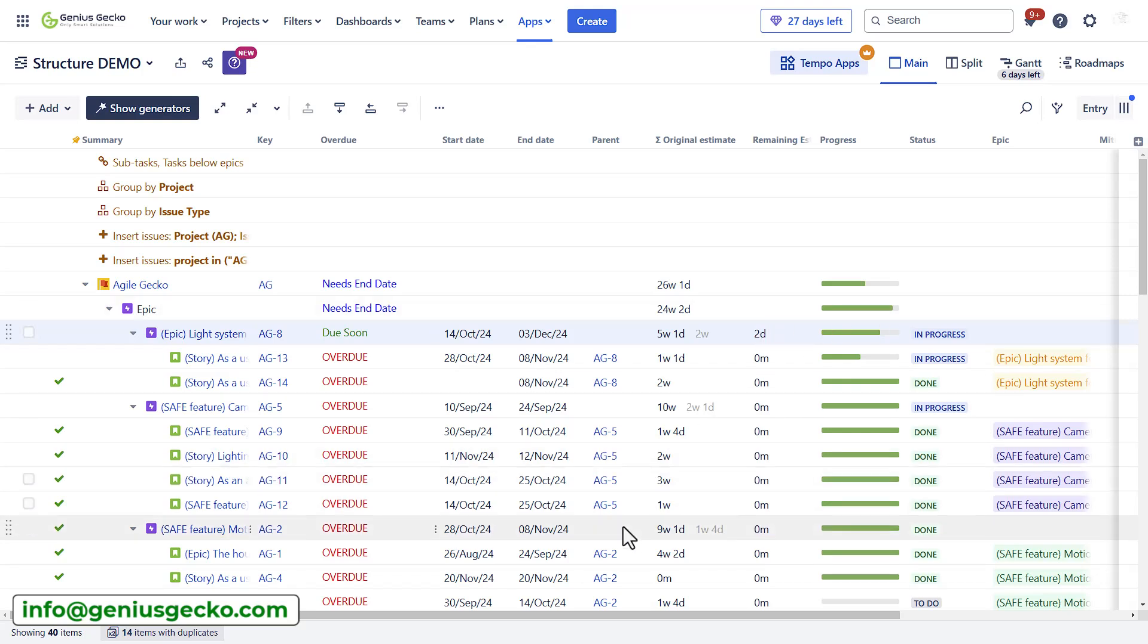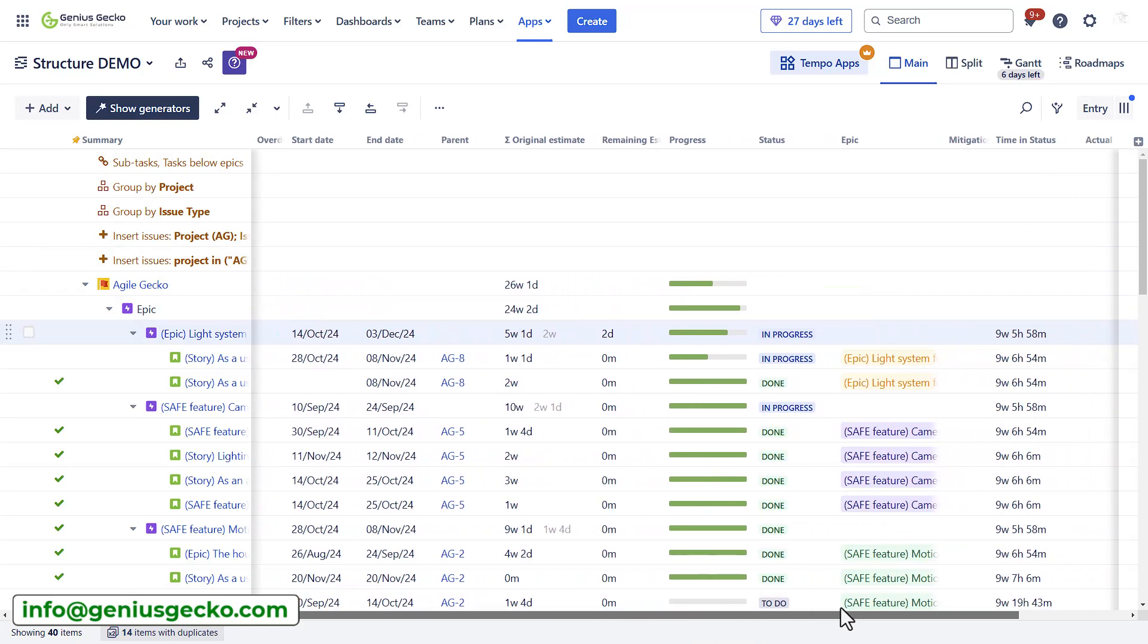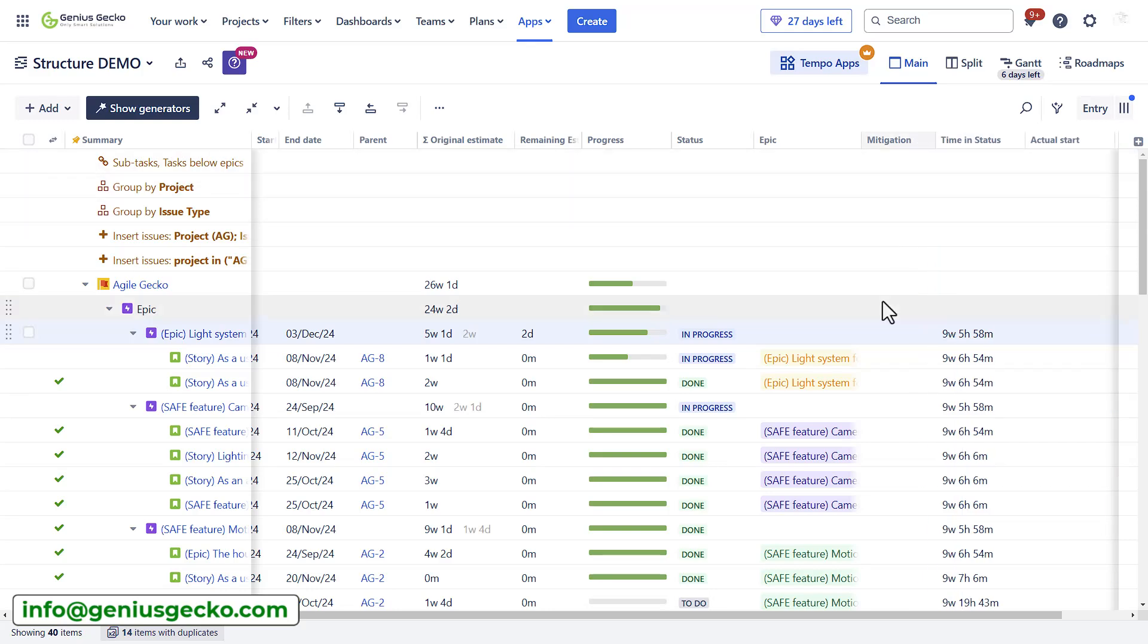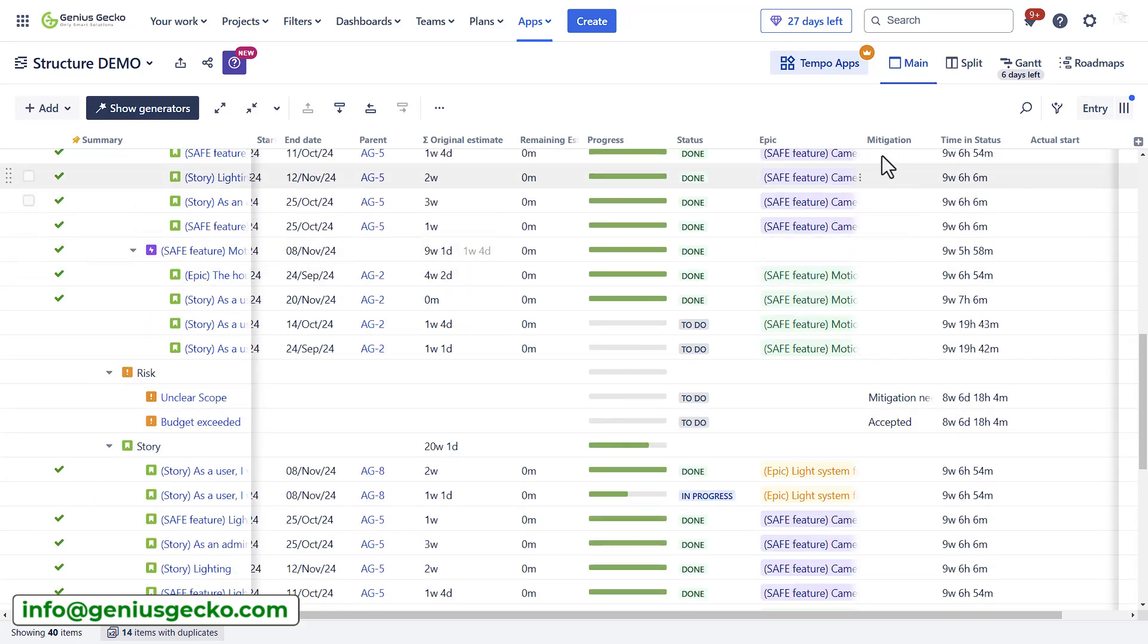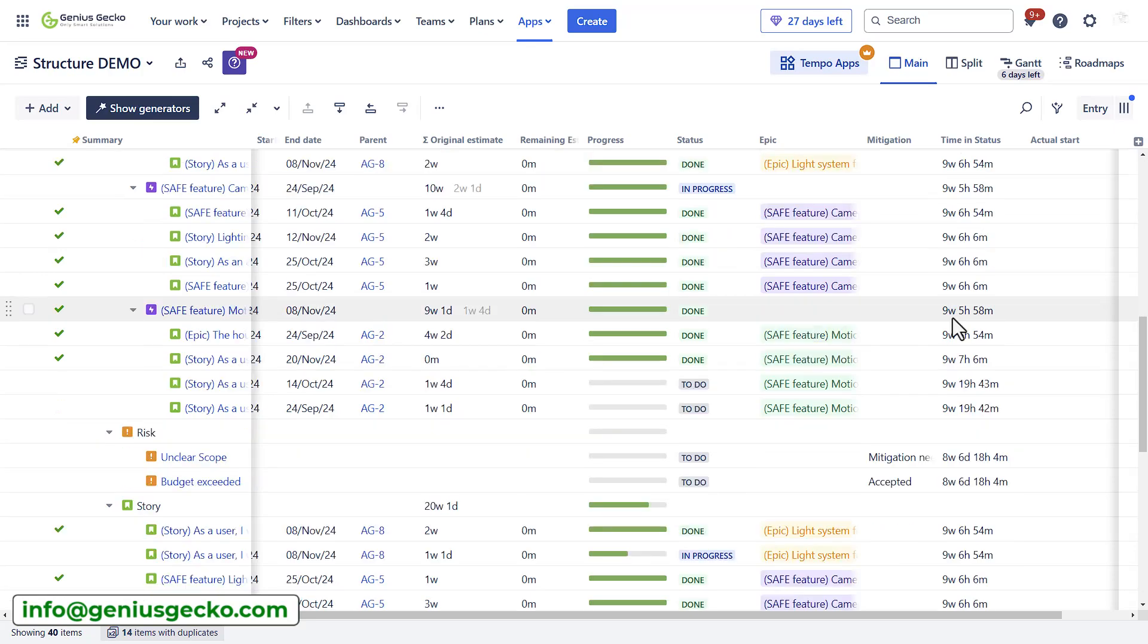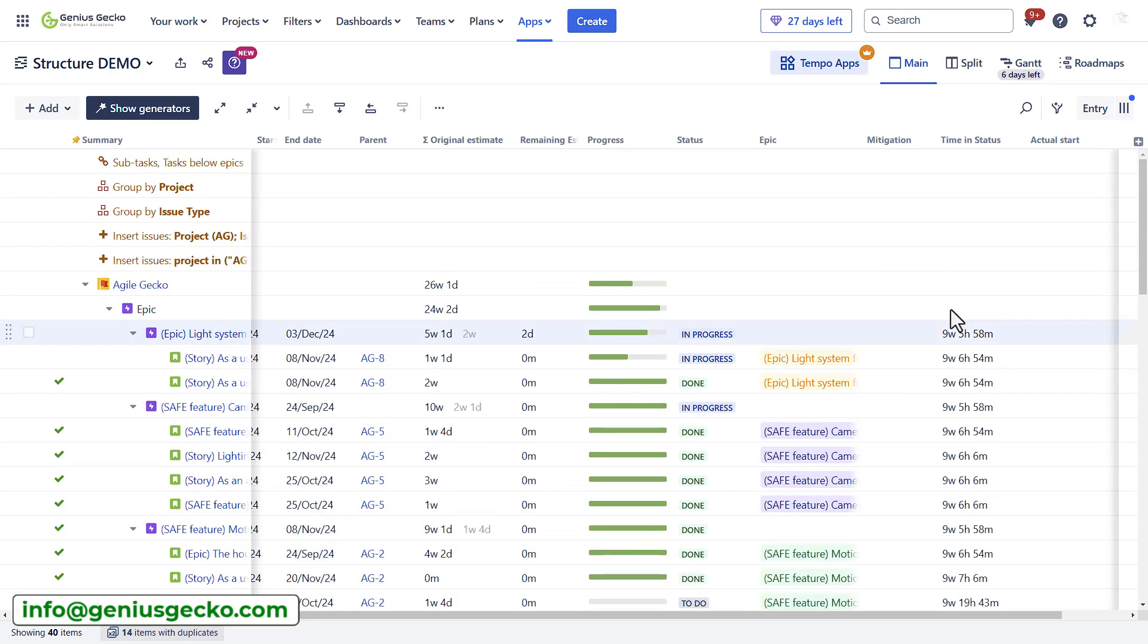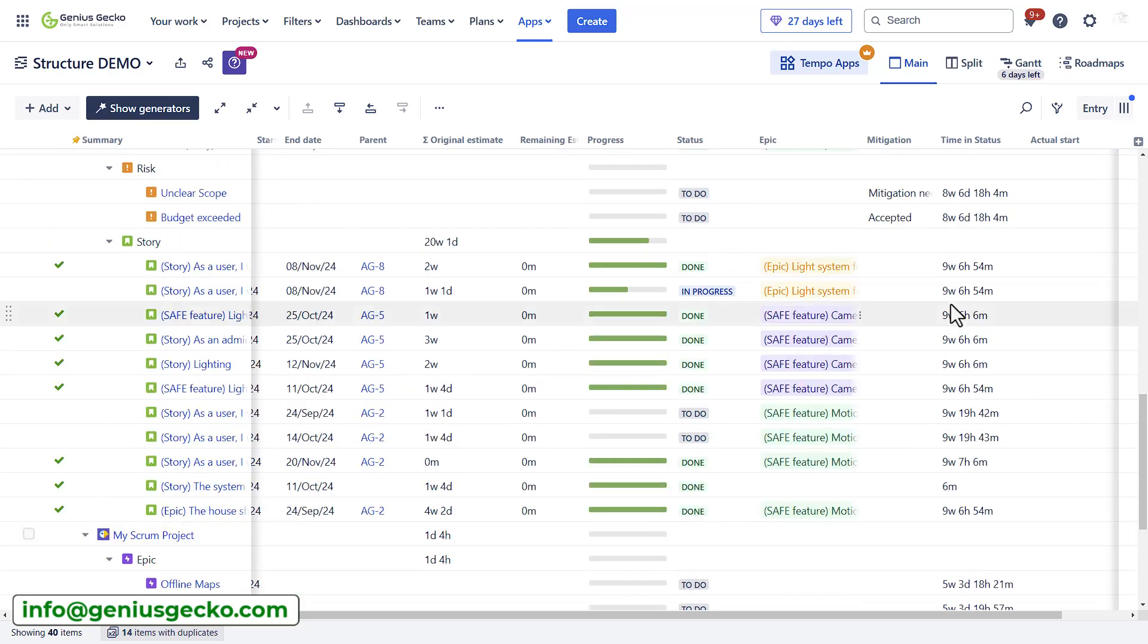I've also added time tracking fields, progress, the status, epics, as well as some flex fields which are available only in structure. For my risks, I've added a mitigation field text type, and I've added some reports, for example, timing status for this project. As you can see, I haven't done much for this particular project in a while.